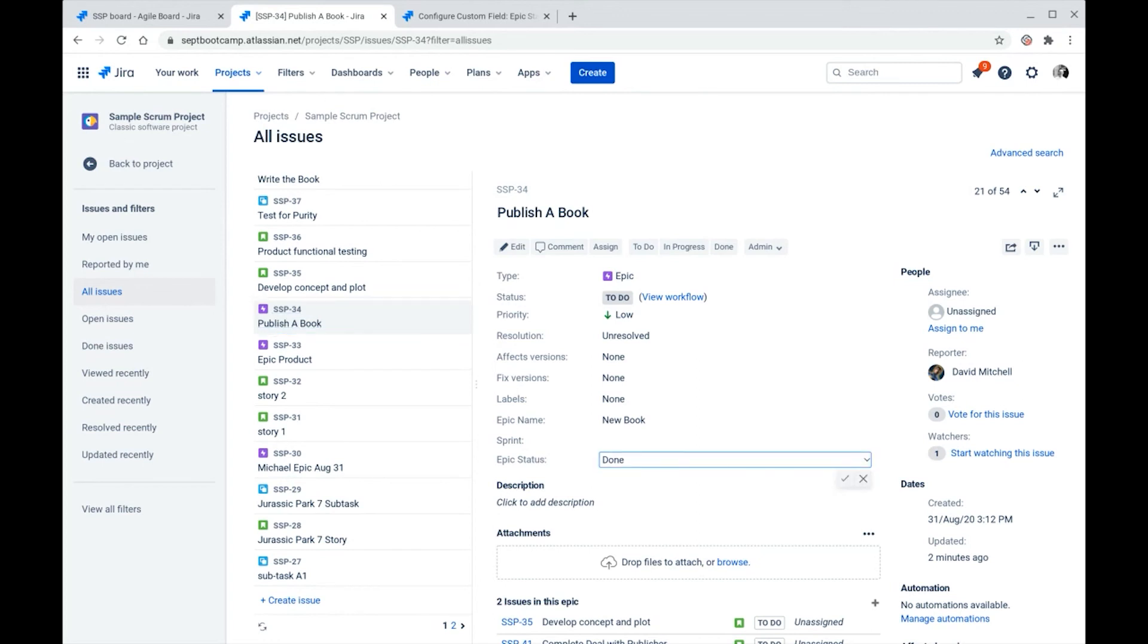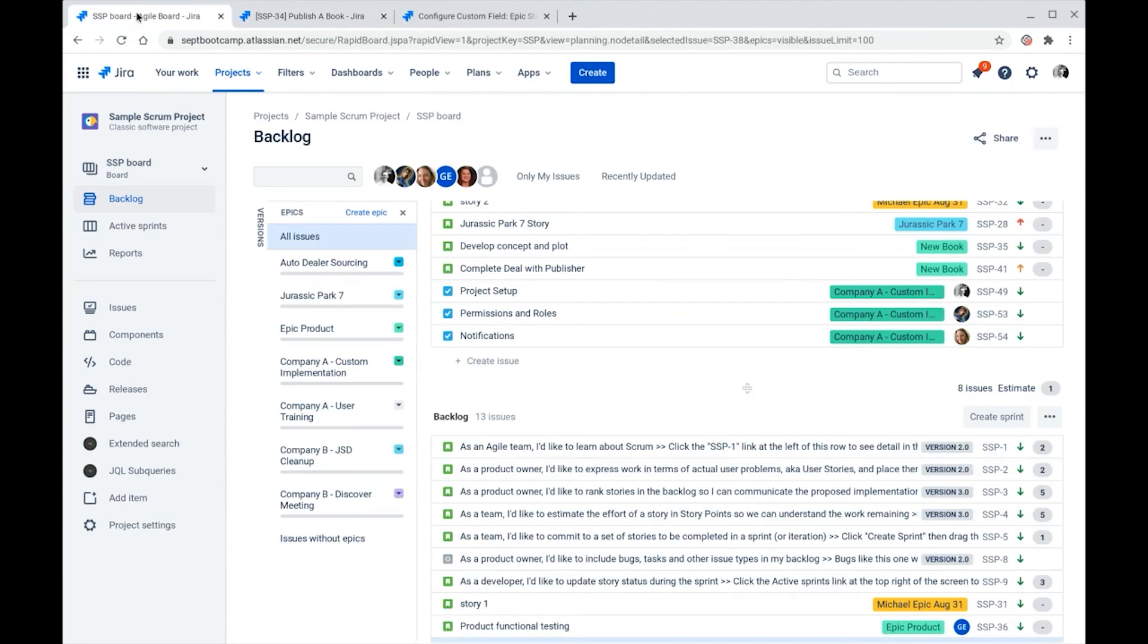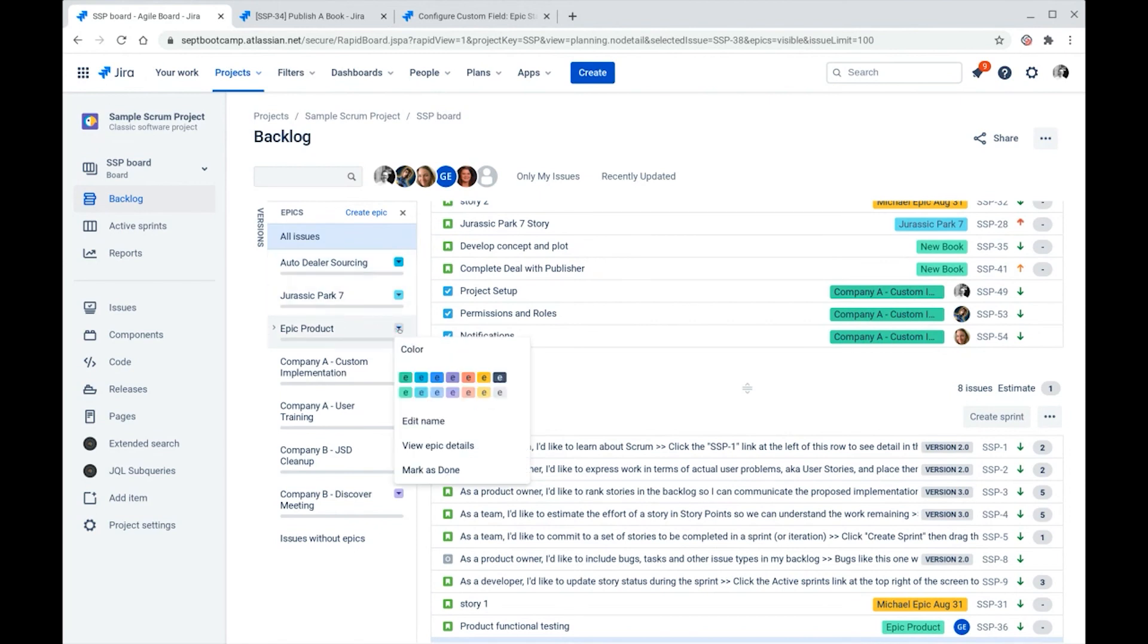The other way is out here in our epic panel on either a scrum board or backlog view or a Kanban backlog view. You can choose this little icon here next to one of the epics. And at the bottom, there is a mark as done menu option. When you choose this, Jira will mark the epic status field to done. And thus it'll go away from this panel.